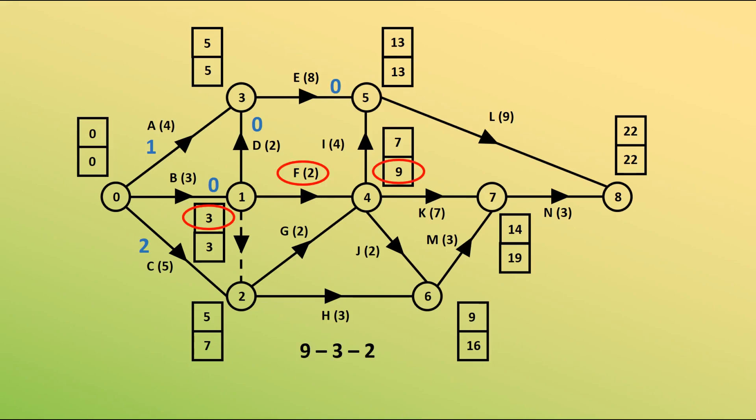F, 9 take away 3 take away 2 is 4. G, 9 take 5 take 2 is 2. H, 16 minus 5 minus 3 is 8. For i, 13 take away 7 take away 4 is 2. J is 7. K is 5. L is 0. M is 7. And finally, n is 5.